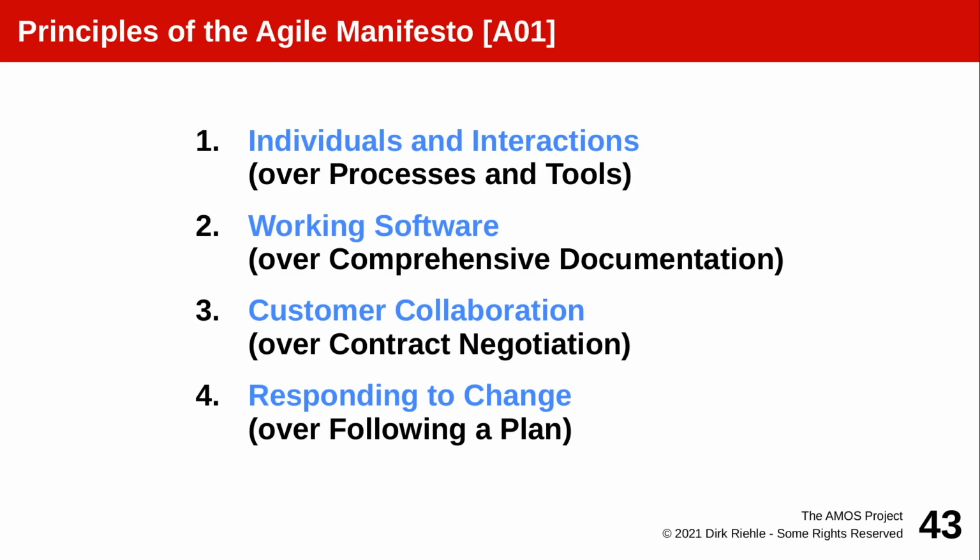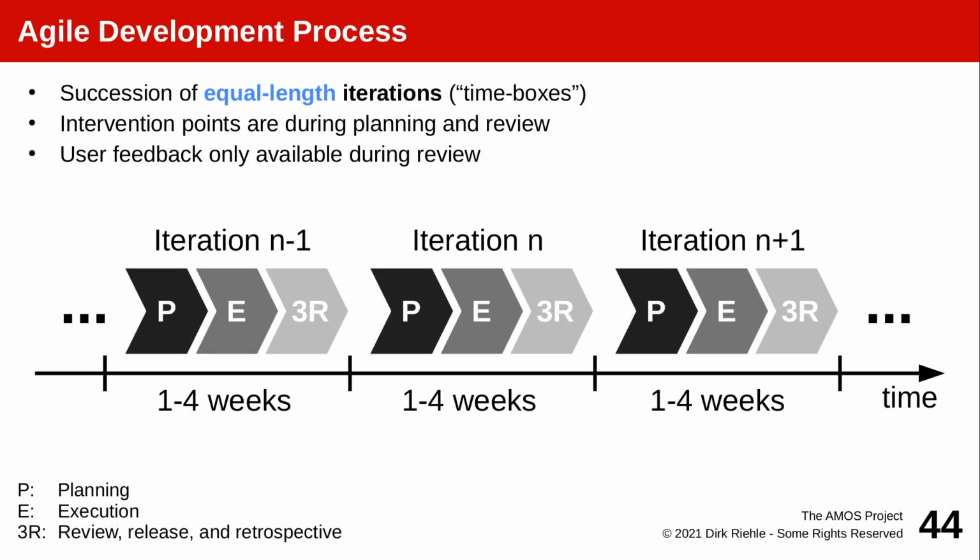And of course, responding to actual change and reality in the regulatory environment, in the businesses, in the markets is better than strictly following that original plan. These are the principles of Agile software development as encoded in the Agile Manifesto. So again, this has led to software development being a sequence of iterations, where one iteration arguably is a little small plan-driven project, but not of size 5 years or 2 years, but of size 1 week or 2 weeks, depending on how long you make your iterations.